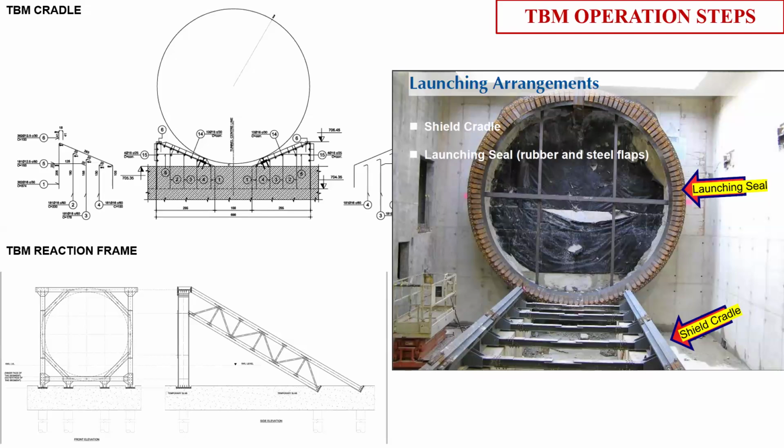That is why the Delhi Metro is making a very small opening, not a full-length shaft. They make a small-length shaft, lower the TBM part by part, and then start the TBM. Sometimes it also depends on the manufacturer. A Terratec TBM does not need all the accessories lowered and mobilized before you start. It can start once your cutter head and shield are lowered, with the backup unit above the ground.